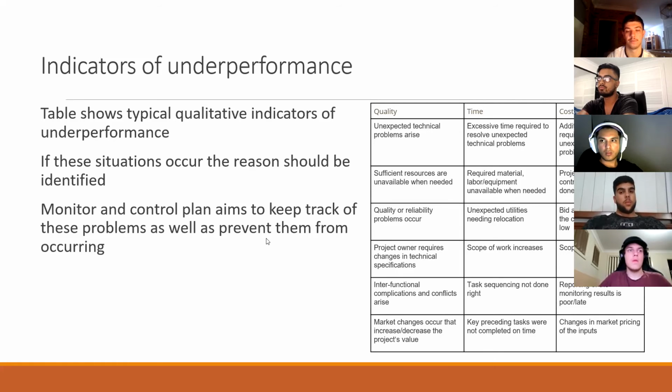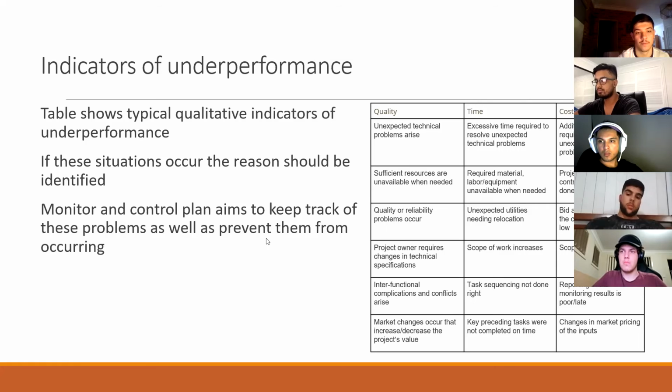The wharf upgrade progress and quality will be measured by assessing how well it is doing against key performance indicators. The key performance indicators for resources are shown along with the standard that they will be held to, the impact if they are not held to the standard, as well as how they will be measured and how often they will be measured. Key performance indicators have also been identified from scope, quality, time, communications, and cost.